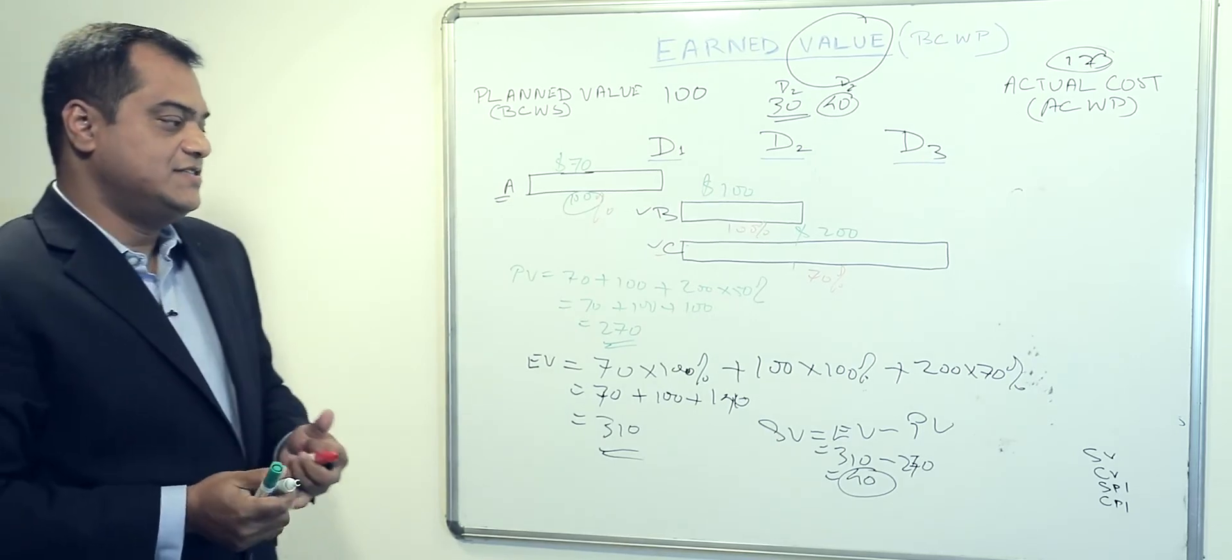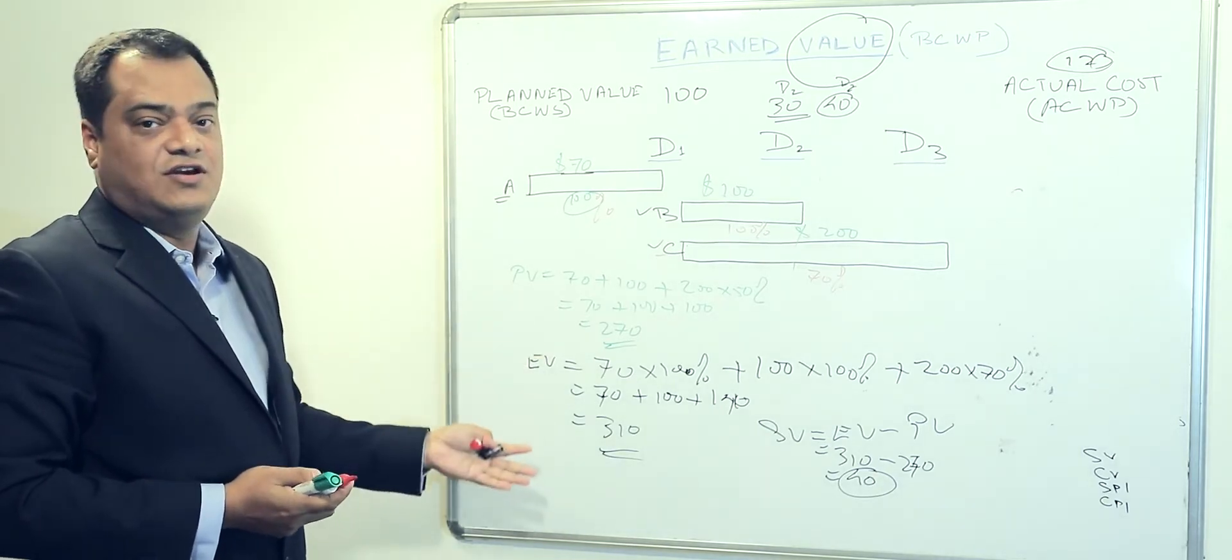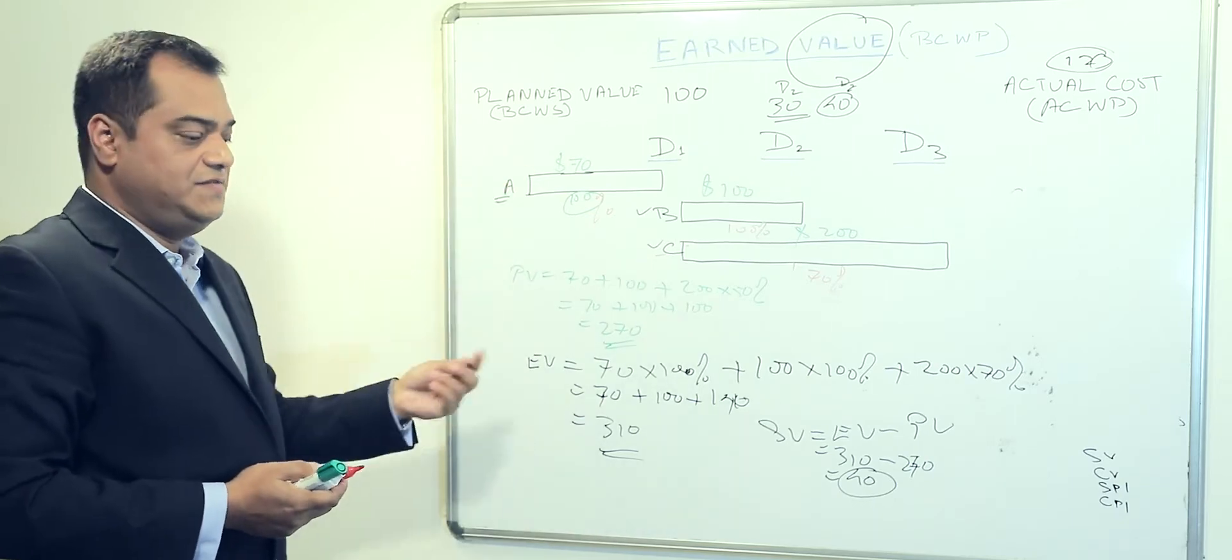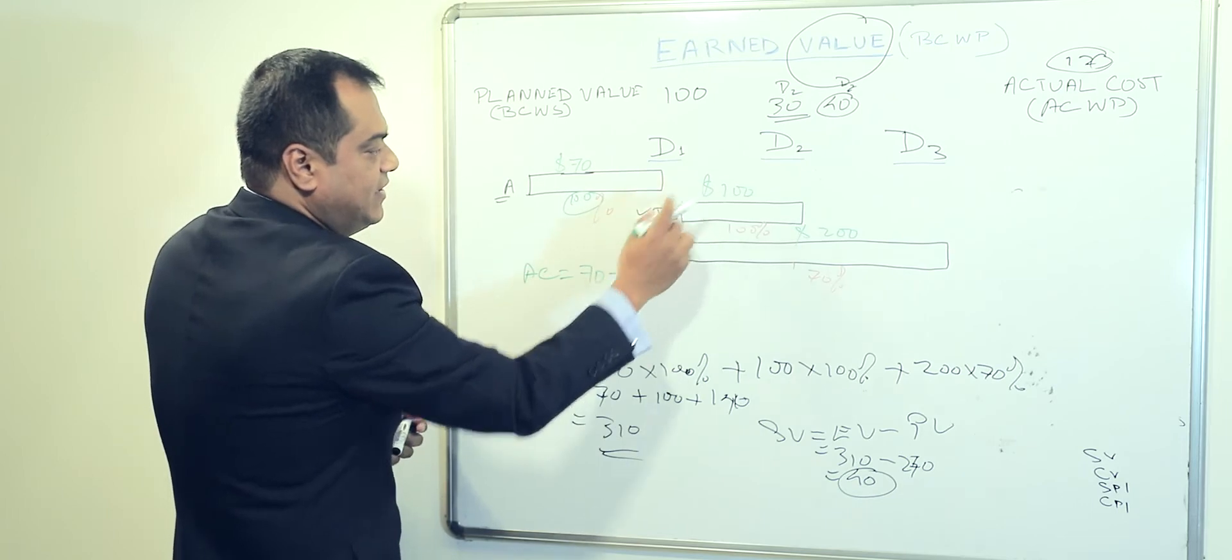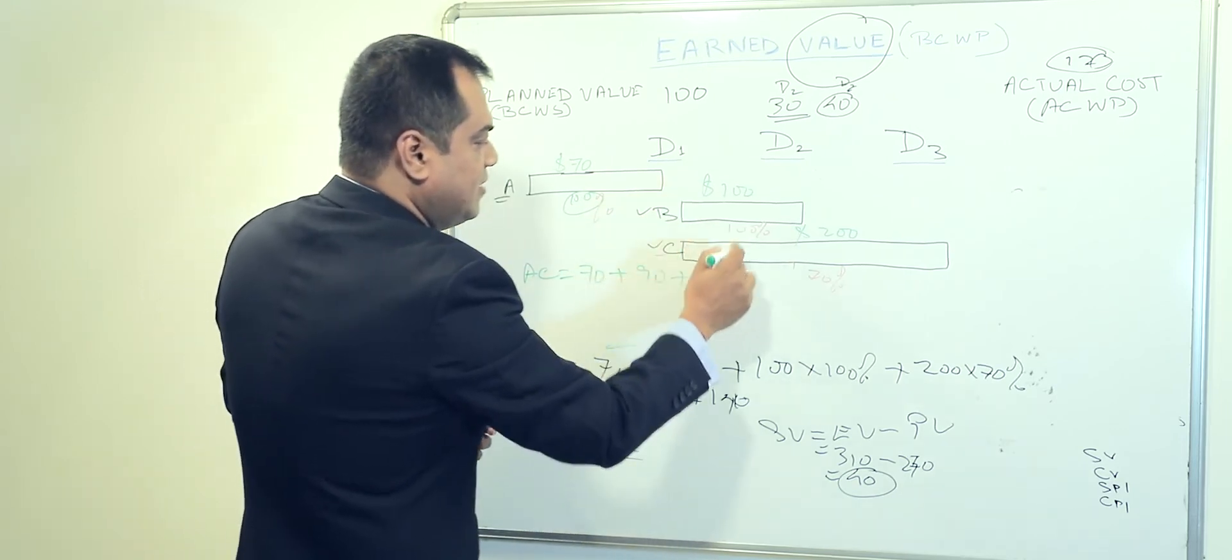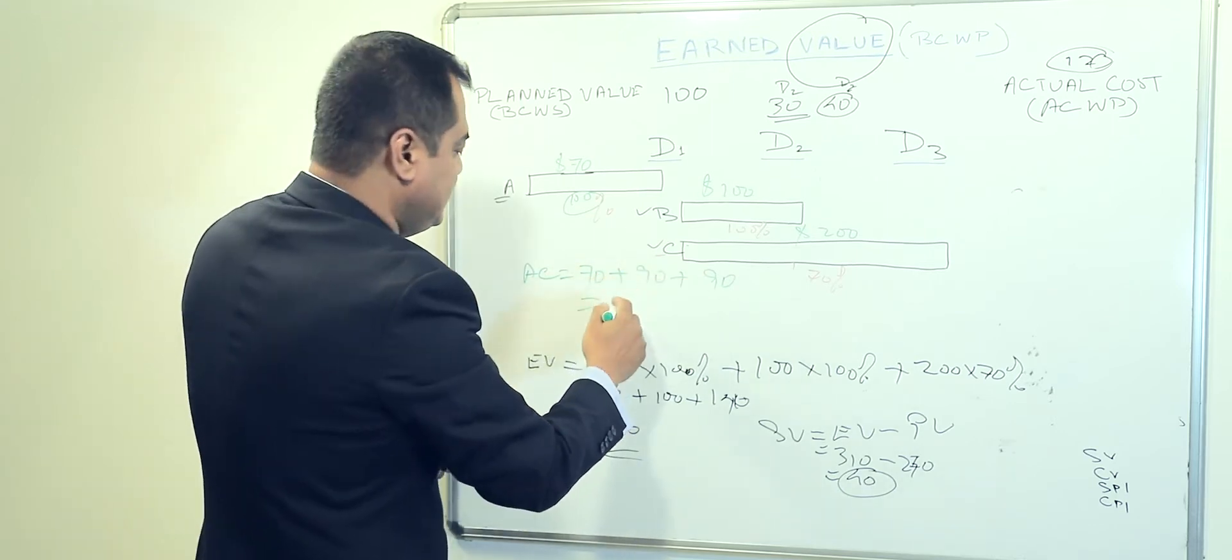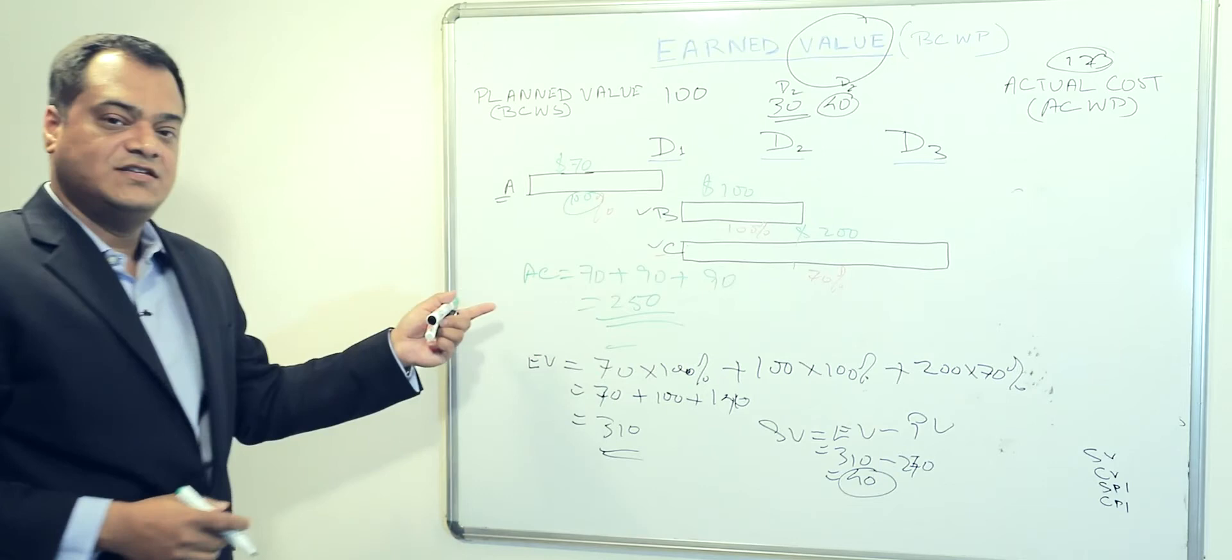Now likewise, we can also compare what is the actual cost of these activities. Let's presume the actual cost is 70 here, 90 here, and here is also 90. So that makes it 70 plus 180, so that makes it 250.